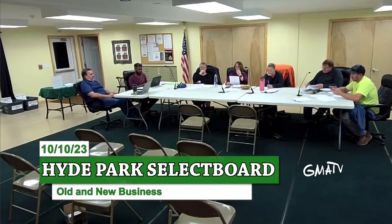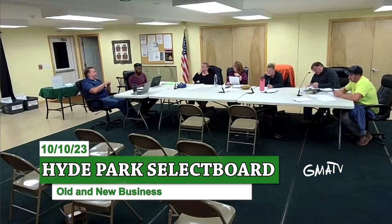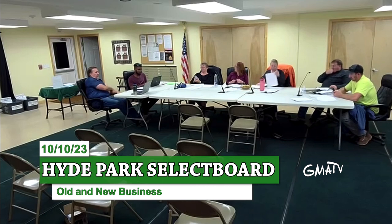I'll second it. For discussion, I did look at what that overage was, and some of it absolutely was unanticipated. There was an original cost estimate from the window people at $64,000, and the grant was $50,000, so there was already a mismatch. We knew that. And then the town attorney got involved, and the easement was a requirement, but not anticipated in the original budget. The town attorney also wanted a survey, also unanticipated. The sign was sort of implied in the grant agreement, but didn't come up as a mandate until later. So some of those things add up to $4,500 or so of additional cost that definitely was not part of the original presentation to the board. So you end up running around $70,000 and $20,000 from other things, including a little bit of a cost increase, but still under the original budget.